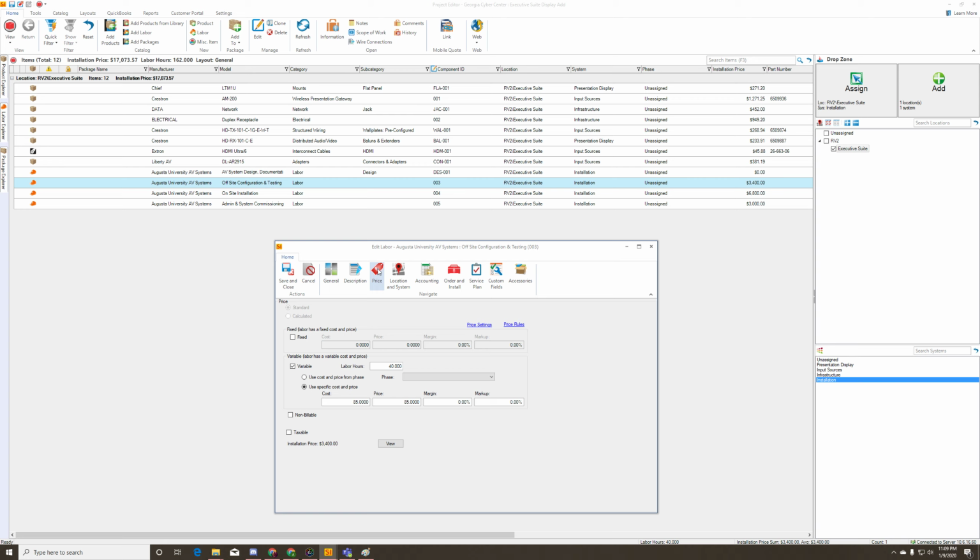And you really just have to go by your gut, a bit of experience on what you assign these hours on these projects. So on this, again, we're just sort of receiving a few items, making sure they're in good working order. We're going to have to transport them to site, things like that. We're going to call that 2 hours of effort.